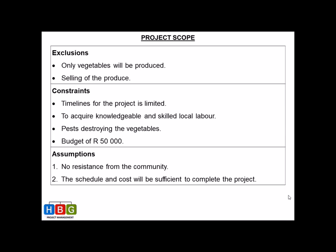Let's look at exclusions. We include exclusions in the project scope because they explicitly tell us what we are not going to do in the project. In this case, we are only going to produce vegetables — not any fruit or trees. And the selling of the produce is not going to happen. It's a community vegetable garden: we produce vegetables and supply them to the community. This way, stakeholders know not to expect anything outside what's listed.